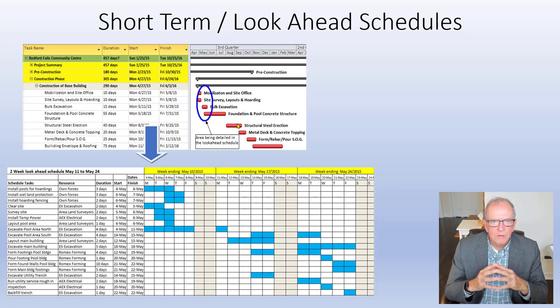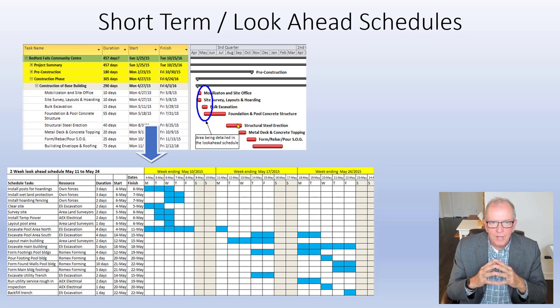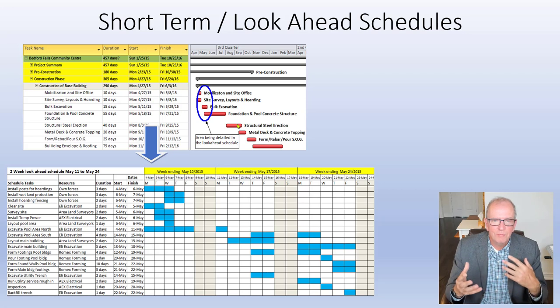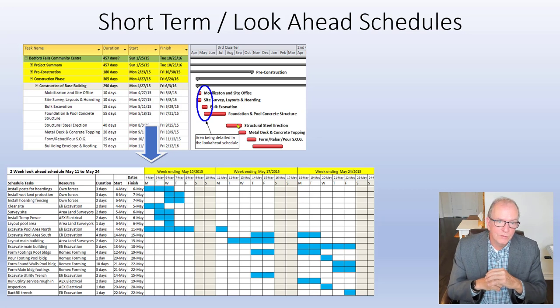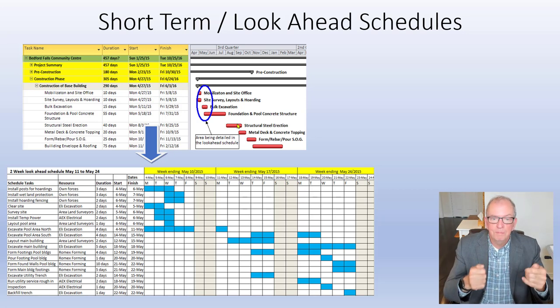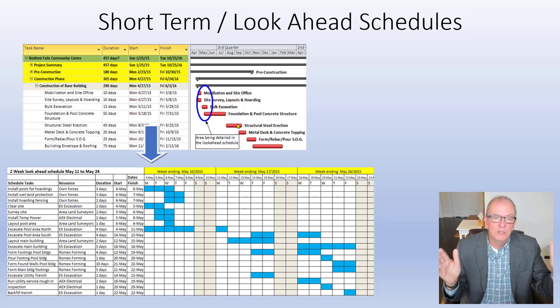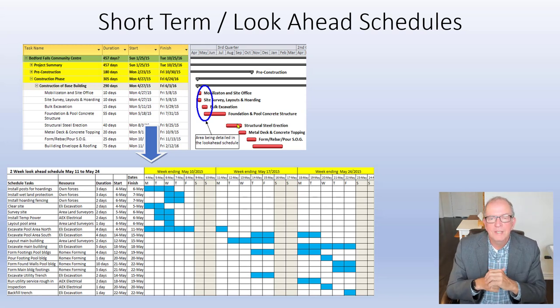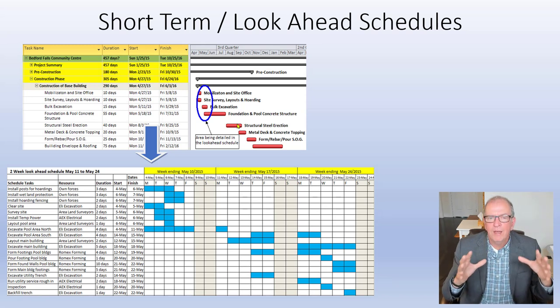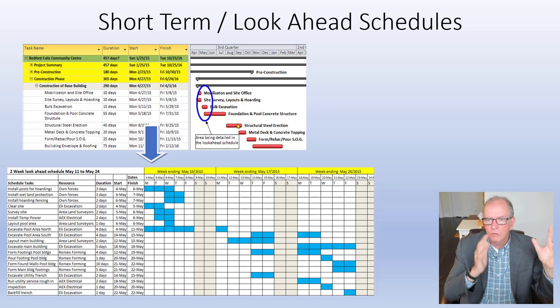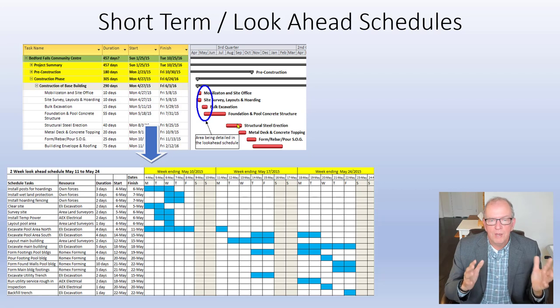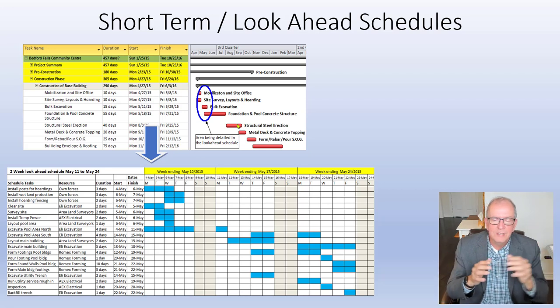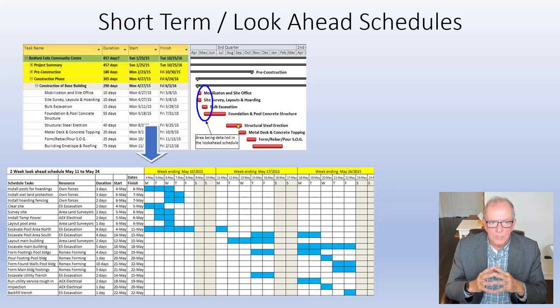Historically we've made some mistakes. We have like one or two people throw together this critical path schedule and then we fly with it. Part of that is our contract process, design-bid-build. The consultants put it out, you have a short period of time to put in a bid schedule that establishes the time period you can complete the project and establish some milestones. But once you're assigned the project, you don't have a good excuse to not develop an effective baseline schedule around those milestone and finish dates.